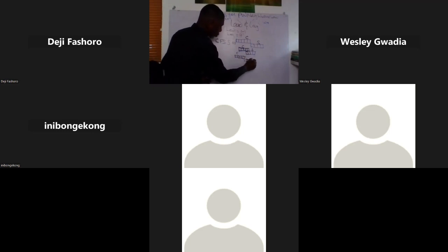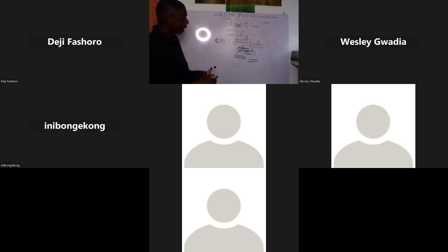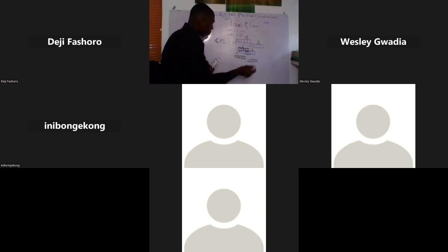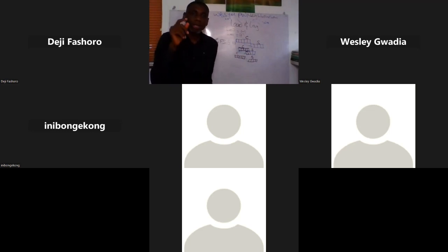So my substructure will start here. Now, because it is the peculiarity of your project, I'm not going to have this. Can you see? So this is a relationship. MS Project will still tie it together for you, this way. So this one now is column finish to start plus 2 days, which means substructure should be delayed by 2 days.